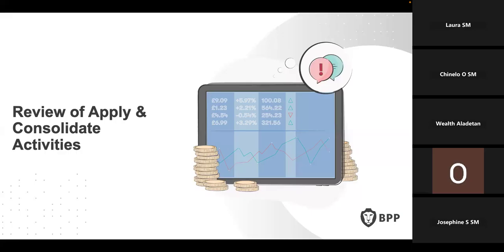the way a project goes, the planning phase is also where issues with resources are handled. Resources, as in who does what. Who do we need for this task? Do we need one BA, two BAs, one product owner, one scrum master, two testers? All these need to be sorted before execution.